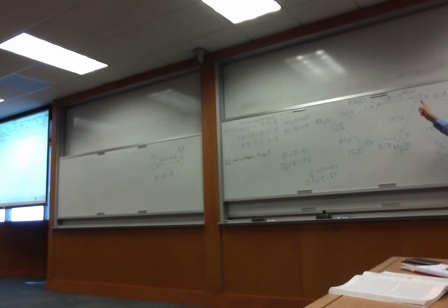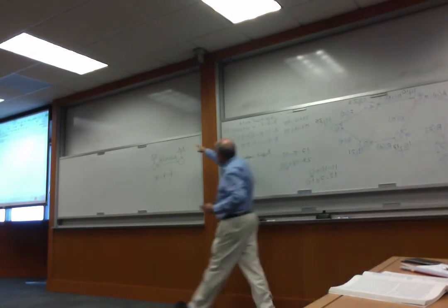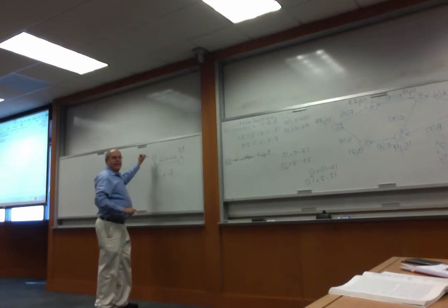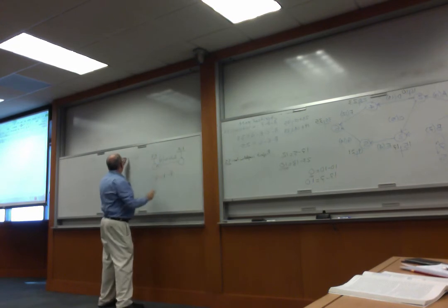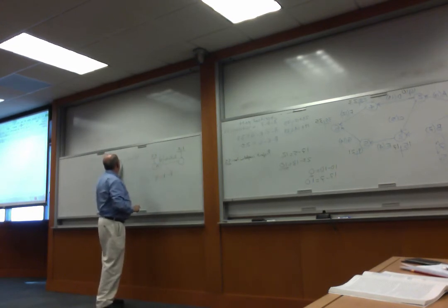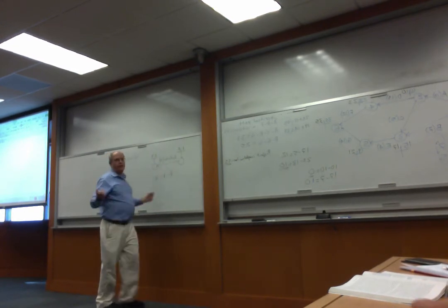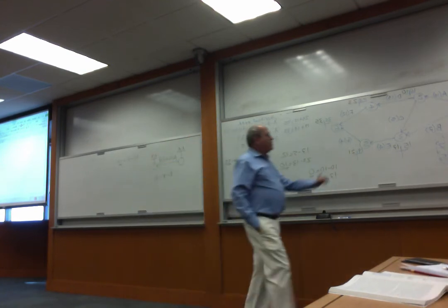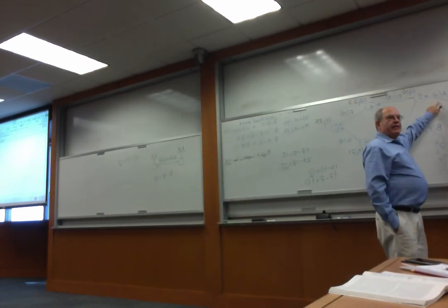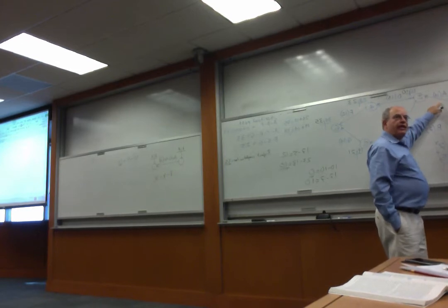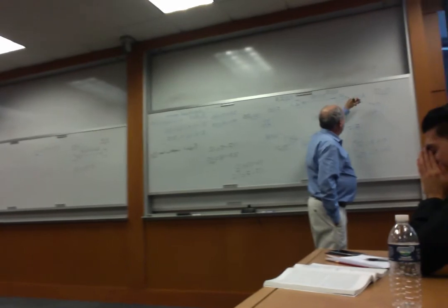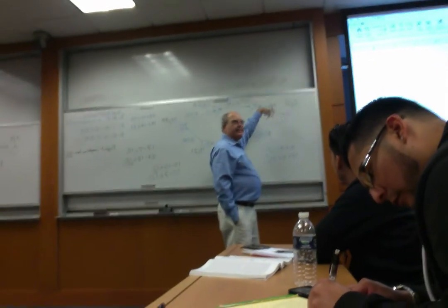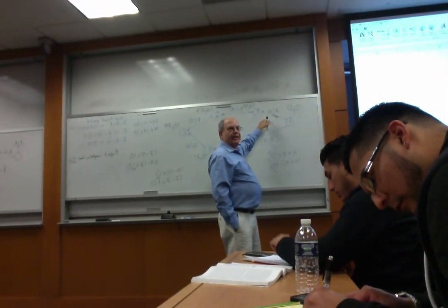Yes. Third condition, remember you put generic K and L: 10 minus the value K, which is 0, should be equal to the length of the activity. So 10 minus 0 is 10. All three conditions are true, so A satisfies all three conditions to be on the critical path. So A is on the critical path. I just put a scribble here, a check mark, to show that A is on the critical path.